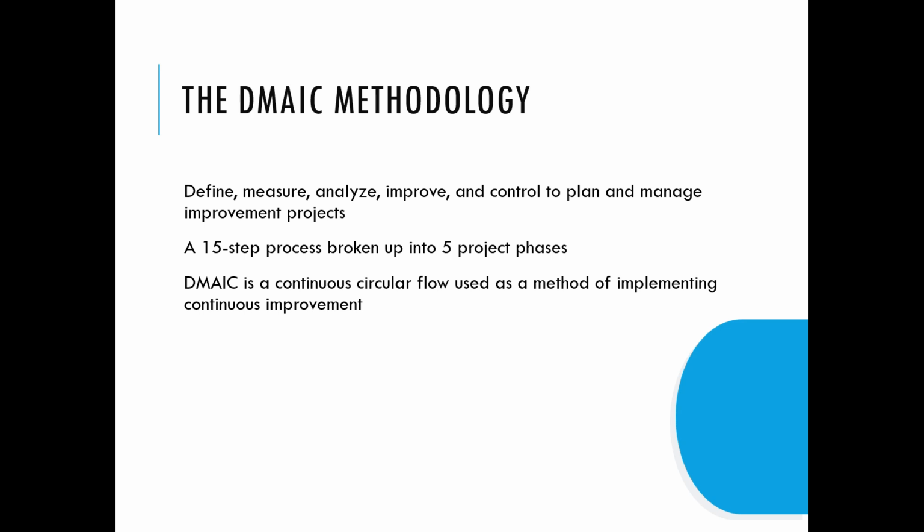The next one is to control quality or controlling quality. Controlling quality deals with measuring the variances with respect to specifications. How much of a variance does the deliverables show with respect to the specification? For this, we use control charts and inspection. And the output of this controlling quality phase is quality control plan.